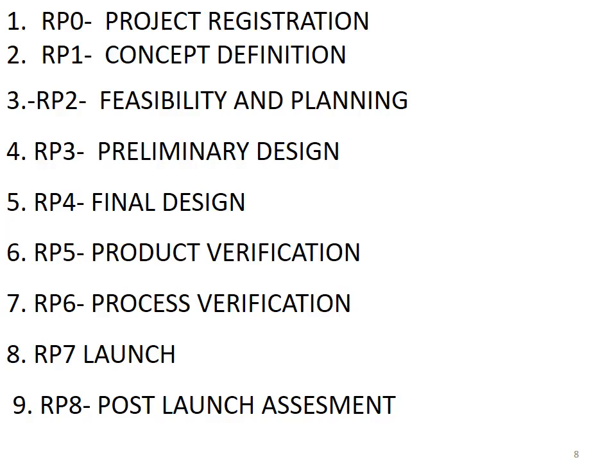If any particular operations need training, so we have to finalize the training plans, obtain regulatory approvals, conduct process verification testing, run manufacturing pilots and finalize the manufacturing control plan, and also verify the supply chain readiness.